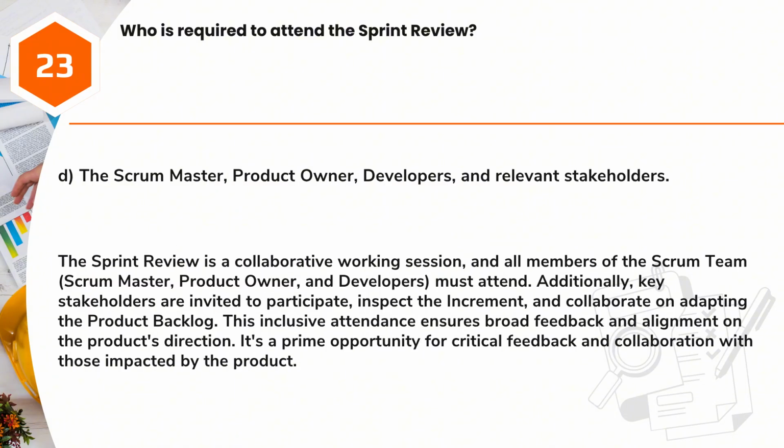Answer: D. The Scrum Master, Product Owner, Developers, and relevant stakeholders. The sprint review is a collaborative working session, and all members of the Scrum team, Scrum Master, Product Owner, and Developers, must attend. Additionally, key stakeholders are invited to participate, inspect the increment, and collaborate on adapting the product backlog. This inclusive attendance ensures broad feedback and alignment on the product's direction. It's a prime opportunity for critical feedback and collaboration with those impacted by the product.